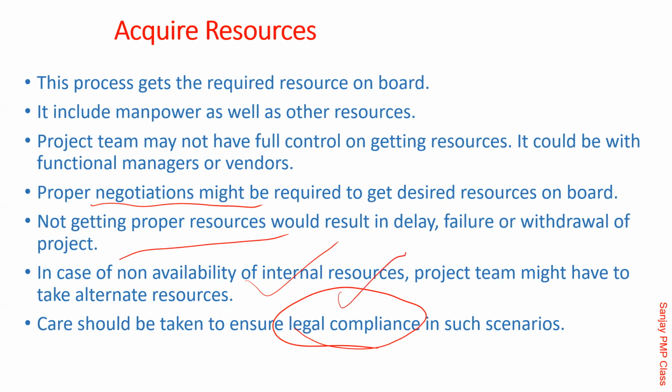If you go to some European countries, asking people to work beyond 5 p.m. has a legal complication. You need to consider it. Asking your own resource, "Can you please come on the Saturday for 4 hours and finish this off," is not a simple thing. In contractual matters, this could be a problem. Are you getting this? Calling a lady in the night shift has its own regulations. You need to follow them. So all those legalities are important and you need to know them, is what he is saying.